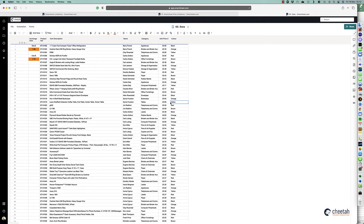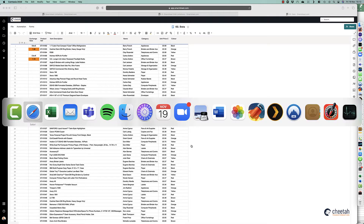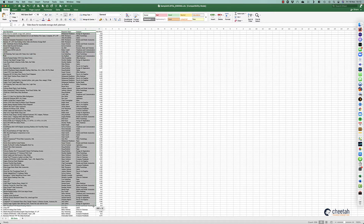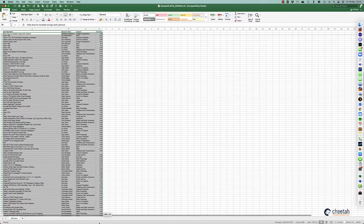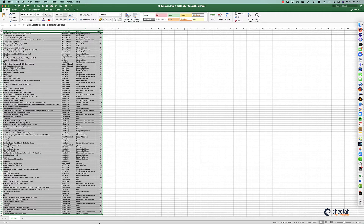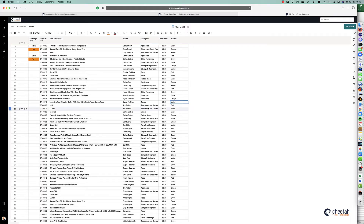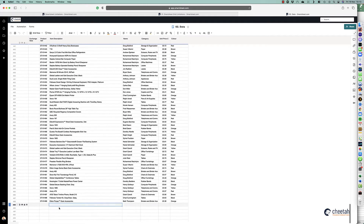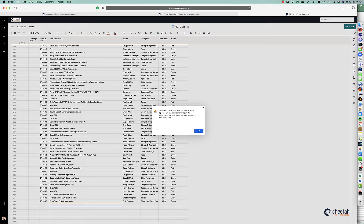The third limitation: you can actually cut and paste information from an Excel sheet into Smartsheet, but there's a limit of 500 rows. For example, if I copy this information which is around 551 rows using Ctrl+C, then go back to my sheet and paste it, you can see an error message saying you cannot paste more than 500 rows at a time.